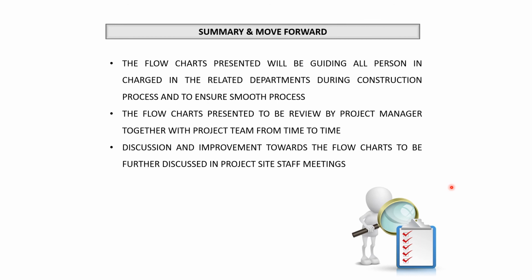The first thing is you have to get the supervisor to report what they achieved yesterday. And secondly, to report what is the target of the progress they want to achieve today. And thirdly, they have to report what are the problems that they face to achieve the target today. Only these 3 things. So the project manager will take these 3 things, and the third one is most important. What are the problems faced by the supervisor to achieve the target?